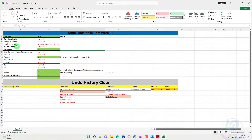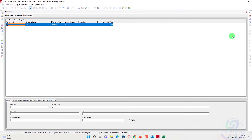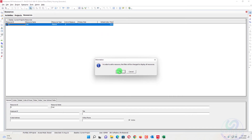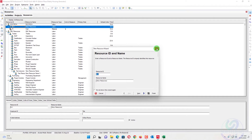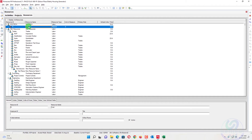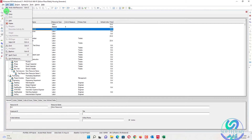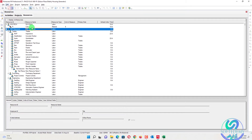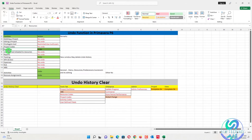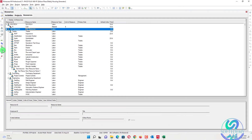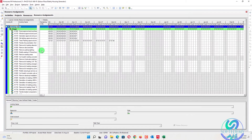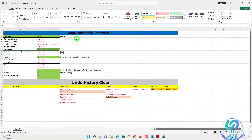Also, you can see that in resources, undo will work. I will open here a resource, I will add a resource, and press the insert option. When we go into Edit, you can see 'Undo Add Resource.' So when we undo, that resource will be deleted. It can be added, it can be deleted — the undo function works at the resources place, and also at resource assignment.